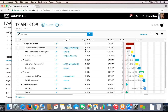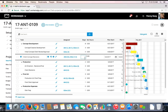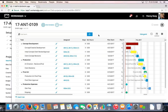Any adjustment I make, I can easily change level of effort as well as duration. With any durational adjustment, you'll notice that the rest of the schedule naturally adjusts because the template was created with workflow dependencies. This gives a very fluid schedule that I can easily adjust and immediately see the ramifications of any change, so I know if a change is going to have an ill effect on my schedule and can further adjust.